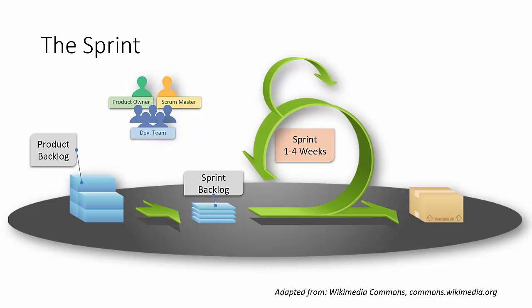And this short list of elements is called the sprint backlog, and it's usually the stories are broken down into tasks that will be performed during the sprint. Finally, they work for 2-3 weeks of the sprint, and at the end, they end up with a product increment that they can hand over to the customer. This product increment is the result of the iteration. These three, product backlog, sprint backlog, and the product increment, are called artifacts. They are the Scrum artifacts.